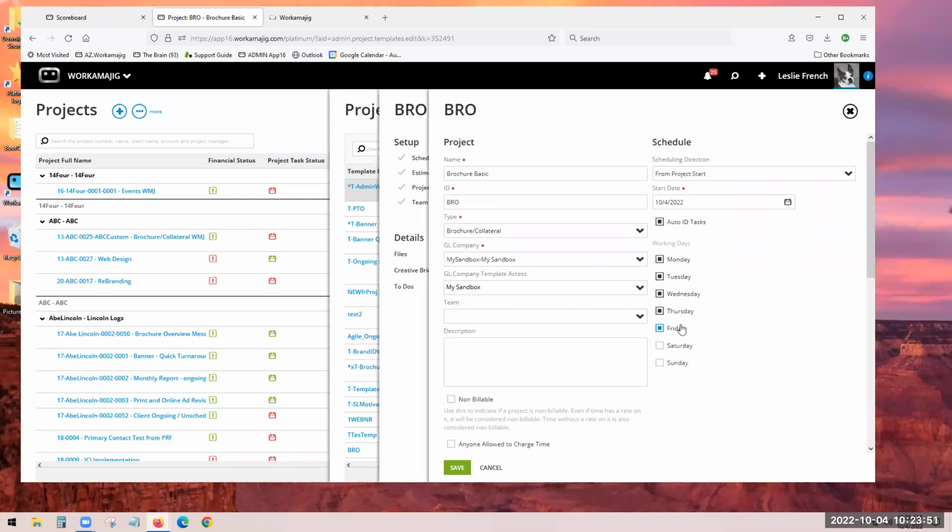Again, holidays will be skipped with the calendar setting. If a project type always works Saturdays, do that in your template. You'll do your team a favor, but that means everything could work on a Saturday, so that still may not be a good setting. We assume that's a basic default.